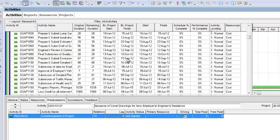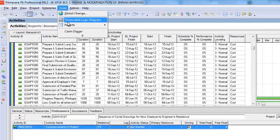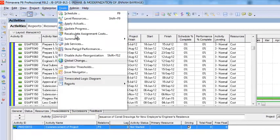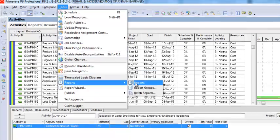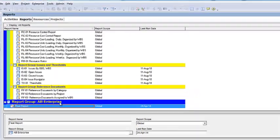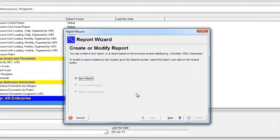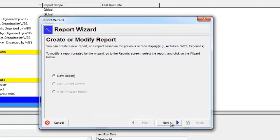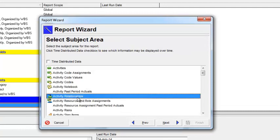But if you have to check the relationship lag of all the activities, you will have to generate a report. For this, go to Tools > Reports > Reports. From here, add a new report. Go to the option, add a new report, and select Activity Relationships.